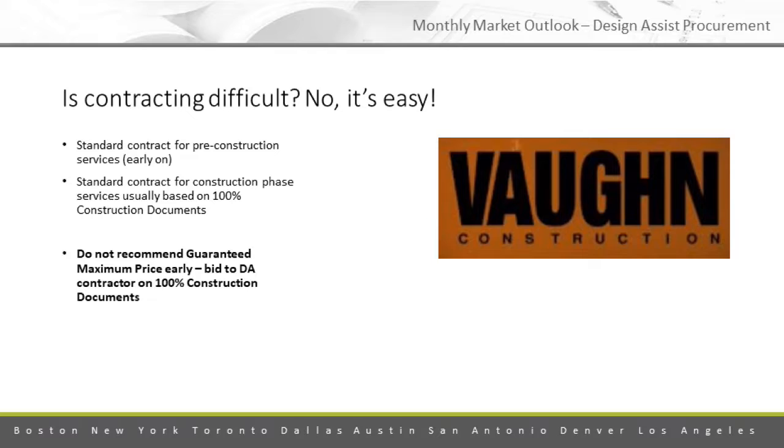You have a defined amount of curtain wall on a job. So a given job has 20,000 square feet of curtain wall. How the details specifically interact with what surrounds doesn't necessarily matter too much to their pricing. So there's a very low risk to locking in with a sub early, or at the time you bring them on board, for items like metal panels or glass and glazing, because it's a defined square footage. And as long as that doesn't change, their price isn't going to change.